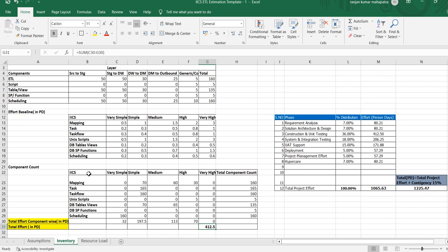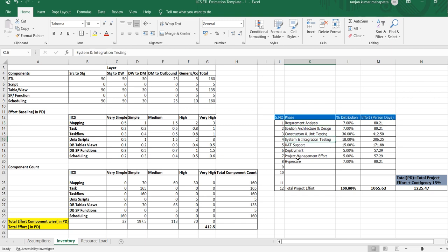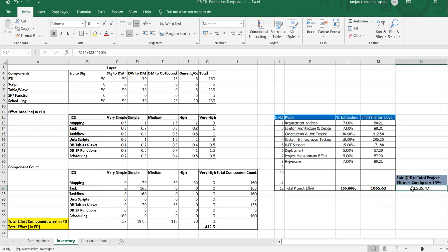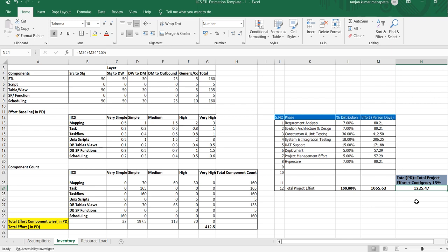Based on that build effort, we defined it at 36%. Then, for the other phases like requirement analysis, solution architecture design, construction, unit testing, SIT, UAT support, deployment, project management, and hypercare, we have defined some percentage — that is called the percentage distribution. Based on that, it comes to 100%, and we calculated it as 1,065 person-days. In the previous video I did not include a contingency plan, so this time I have added a 15% buffer. After adding 15%, it came to around 1,225.47 person-days.